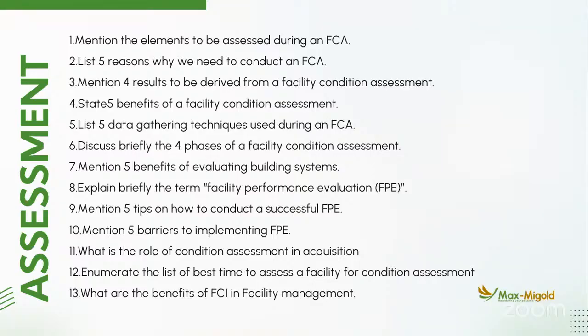That's why I said your table in that 2-bedroom flat is an asset, and you want to know the detail of that table. That's why you need to provide the engineering detail in terms of the length, the breadth, and the height of the table. Now, when you are doing your condition assessment of the building wall and the sitting room, you want to change tiles. What is the dimension of the floor tiles? You can't just say, I want to change the living room tiles. What is the dimension of the living room? It's 6 meters by 6 meters.